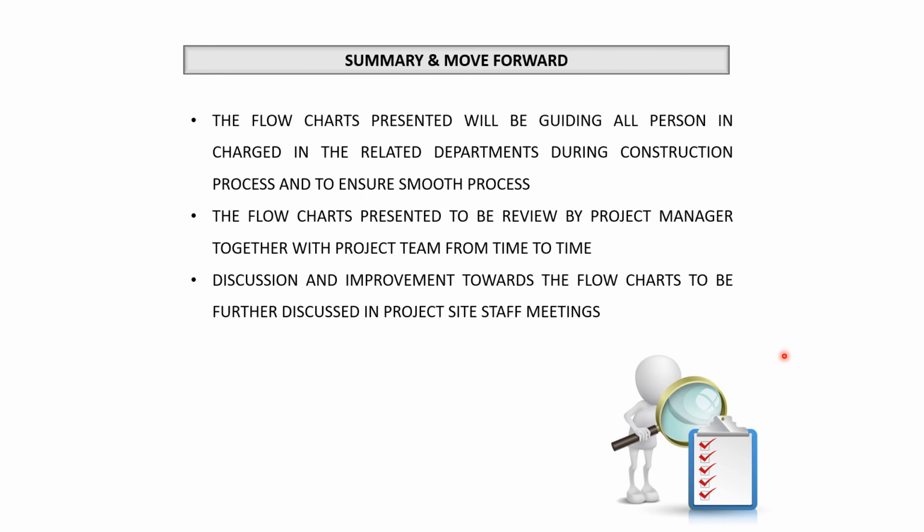He can take like 1 or 2 hours to conduct this meeting with his site staff team, and we can discuss the documentation, what is the progress of the documentation, and he can review what are the problems faced to complete the documentation, and he can do an improvement discussion throughout the week, what they can do as a lesson learnt. He can also start to do the lesson learnt from the week, what they can record and produce, and he can also discuss the progress for next week during the staff meeting.